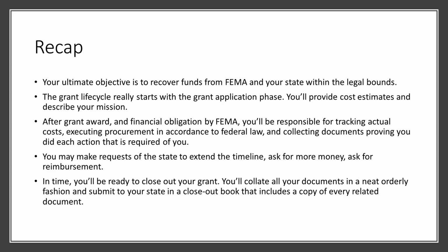The grant lifecycle really starts with the grant application phase. You'll provide cost estimates and describe your mission. After grant award and financial obligation by FEMA, you'll be responsible for tracking actual costs, executing procurement in accordance to federal law, and collecting documents proving you did each action that is required of you. You may make requests of the state to extend timelines, ask for more money, ask for reimbursement. In time, you'll be ready to close out your grant. You'll collate all of your documents in a nice, neat, orderly fashion and submit them to your state. Note that this may seem like a duplicate process. You gave them this or you gave them that. It doesn't matter. Your closeout book is the complete story from bang to closeout, inclusive.